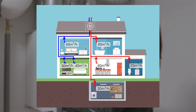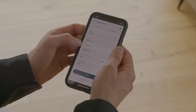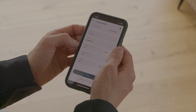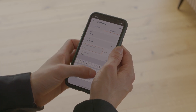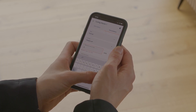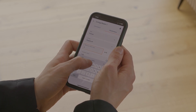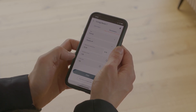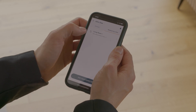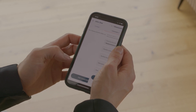During commissioning, the outlets are set to the target volume flows. Before the measurement, the measuring points must be created in the Testo Smart app, and the air type and the reference volume flow must be entered for each measuring point.